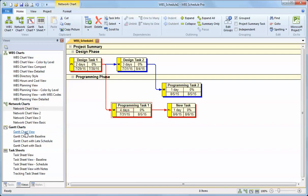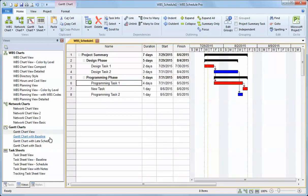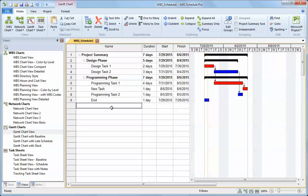The Gantt chart is another way to refine the plan. I can add additional tasks here. I can even add milestones. So a milestone is defined as a zero day task.